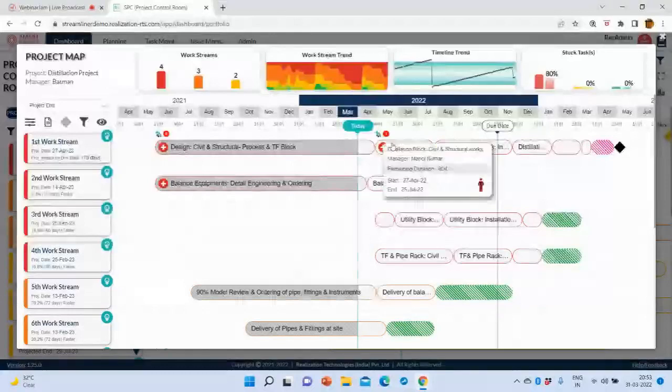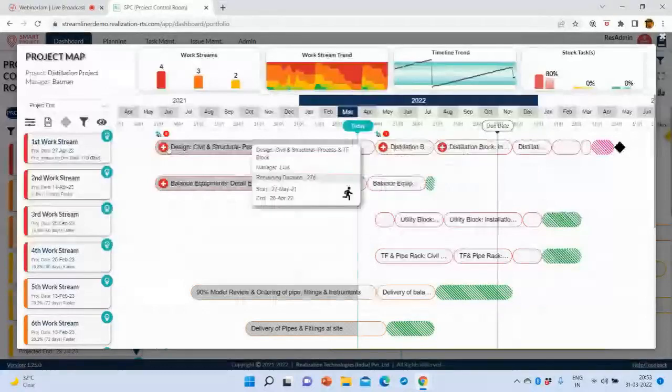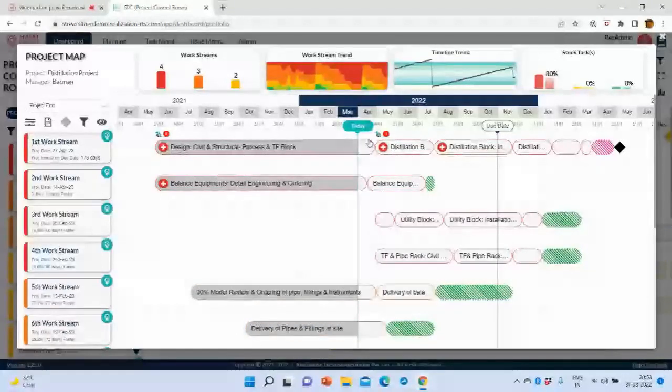So the way to model the boxes would be to take off engineering in one box, hand it over completely, and a clean handover to the contractor, so that the accountability, the handover, everything is very clear. And there are no integration points to manage after the contractor starts the work.